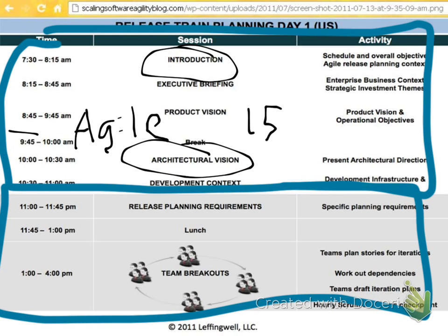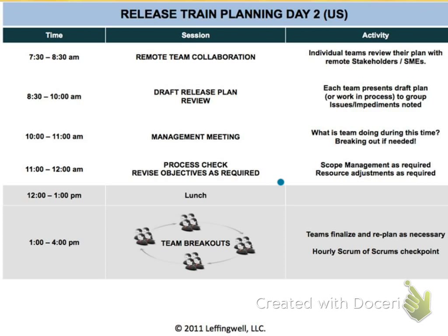Also, another thing that usually happens at about 4 o'clock is what's referred to as the OSM meeting. This is usually the oh shit meeting. What happens there is somebody's not getting one of their features done, and usually you need to get out into a breakout room and figure out how are we going to get that stuff done. Usually after a few PSIs, these things hopefully will go away as you do a little pre-planning in order for the first day meeting.